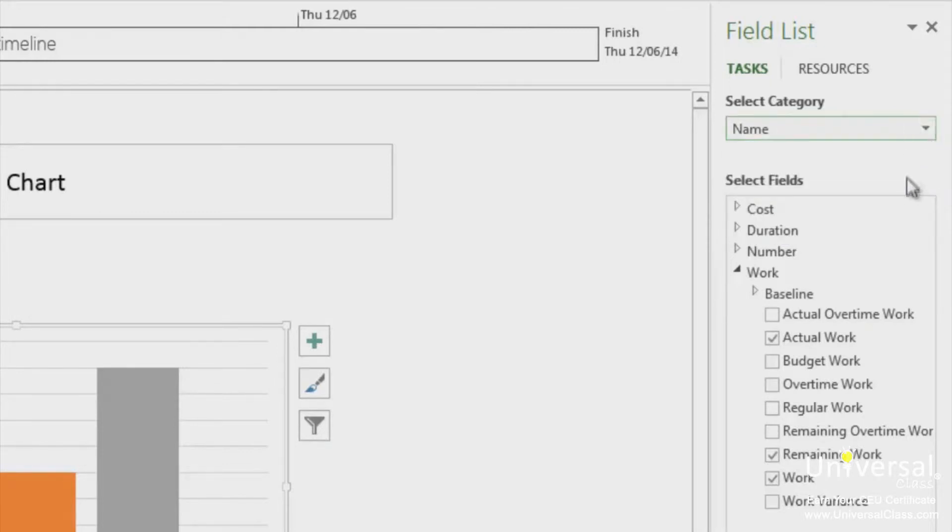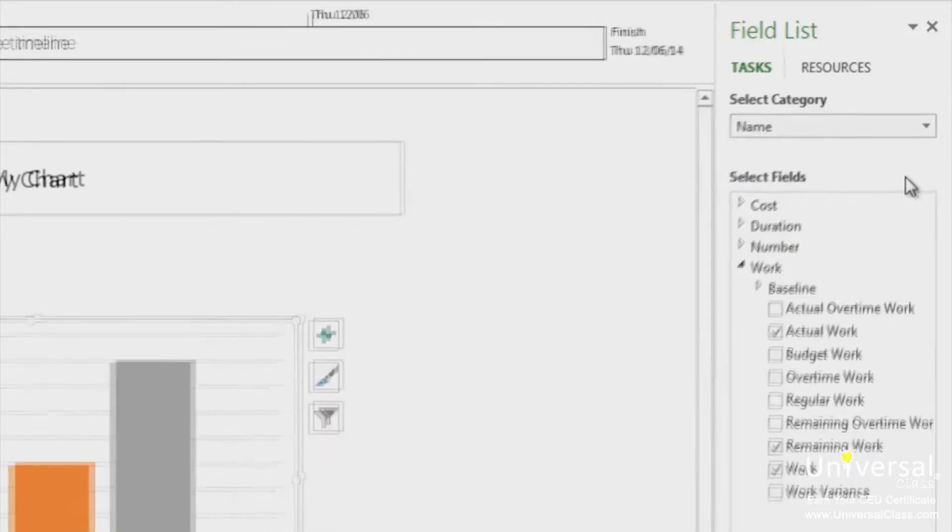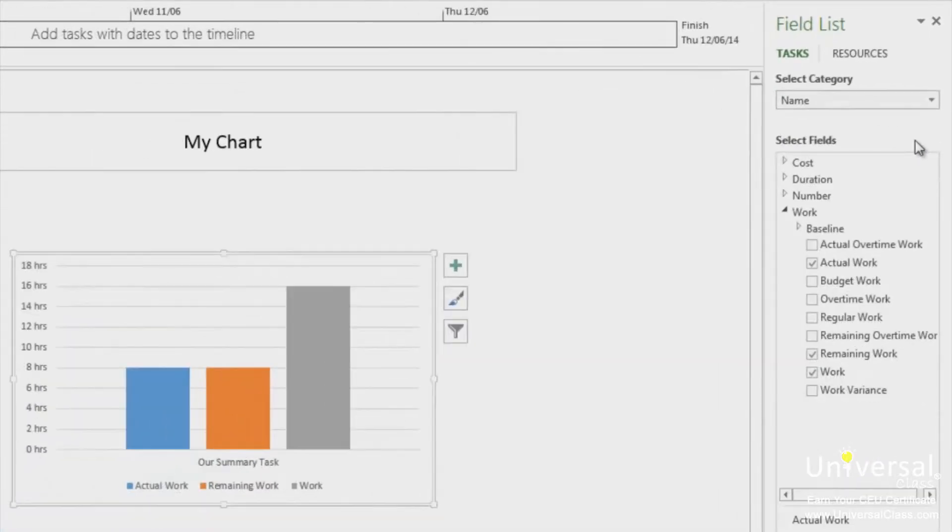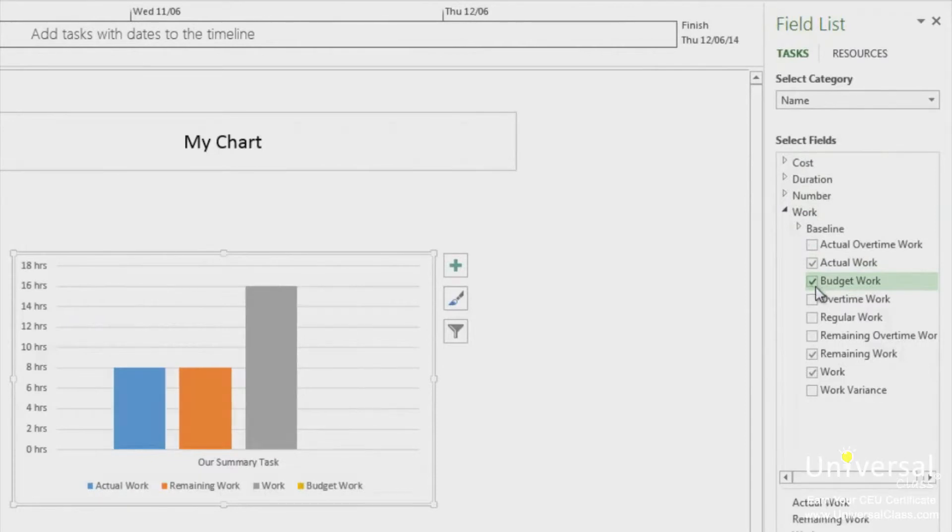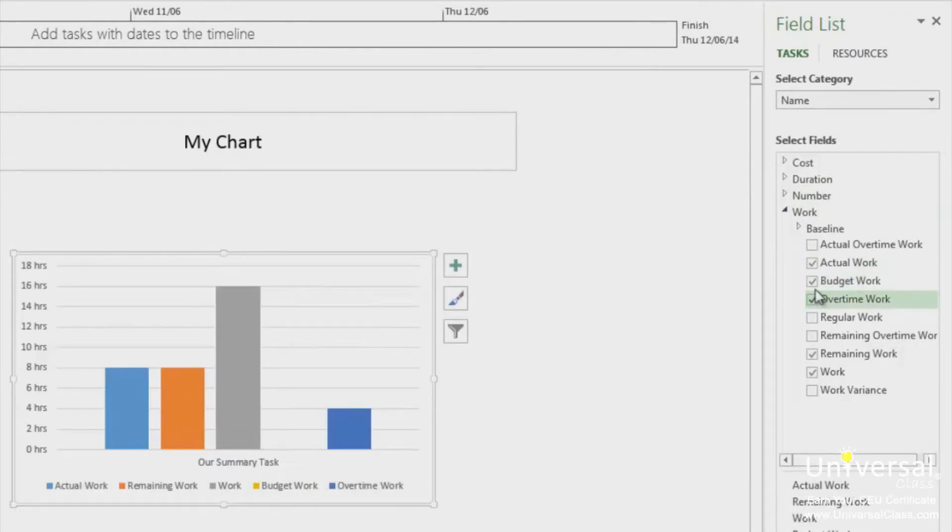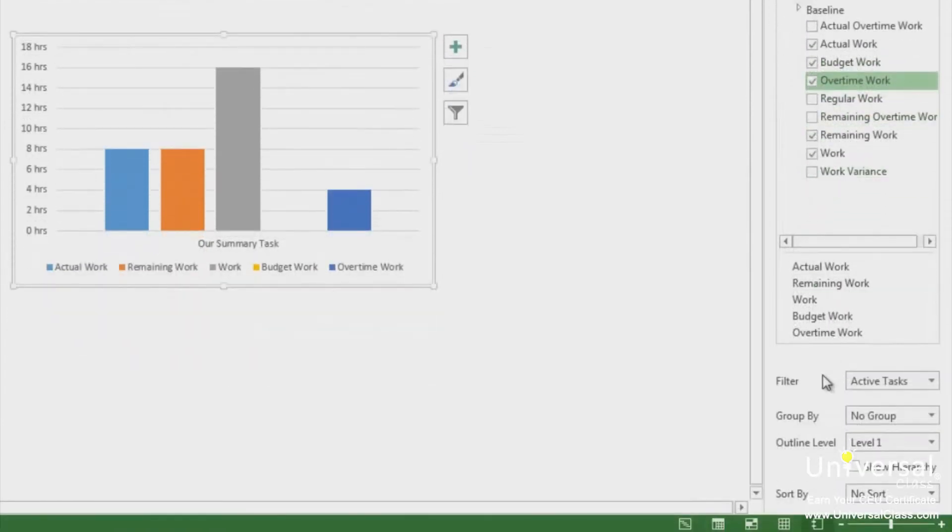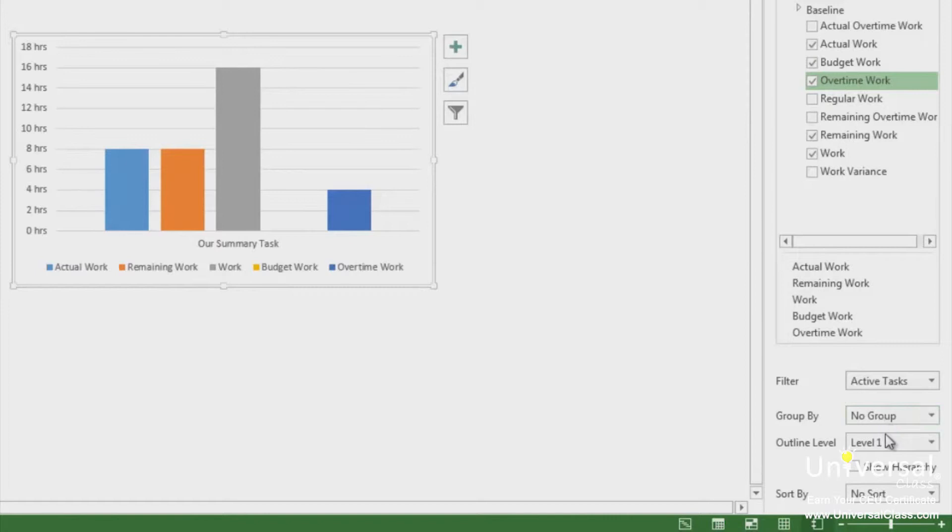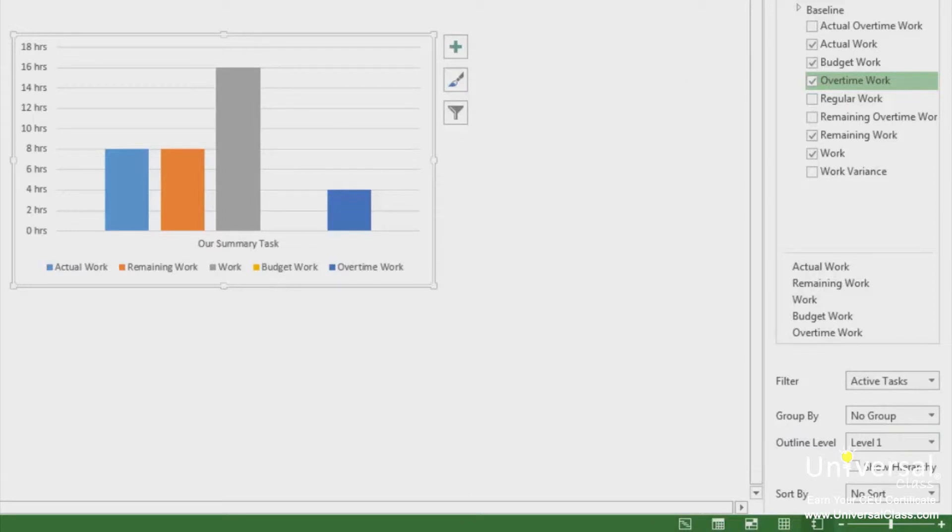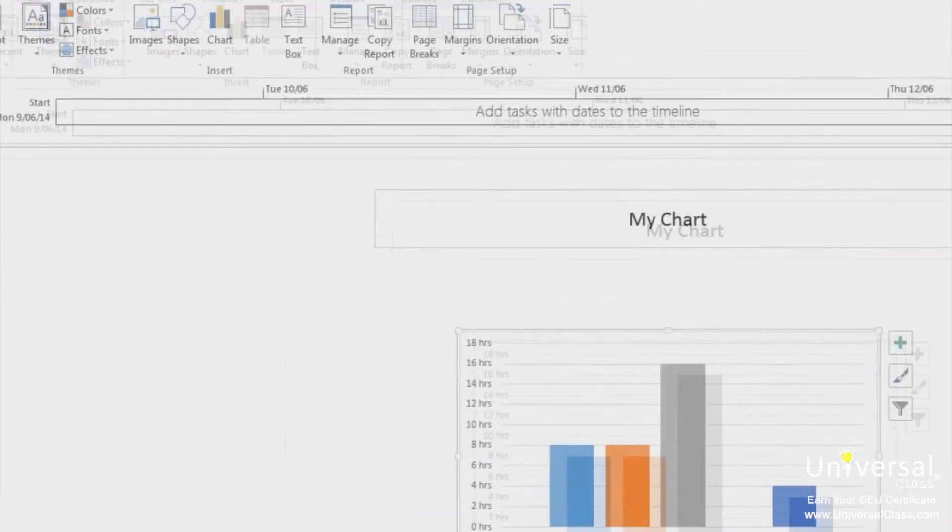Next, go to the Select Fields category and choose the fields you want in your report by checking the boxes. You can also apply a filter if you want. Select Grouping from the Group By dropdown menu if you want to group information. Select a level you want to view information. Level 1 is the entire project. Finally, choose how you want the data sorted. This is the order you want the data presented based on the fields you've chosen. You can click Enter to view the report. The report is saved under Custom under the Report tab.